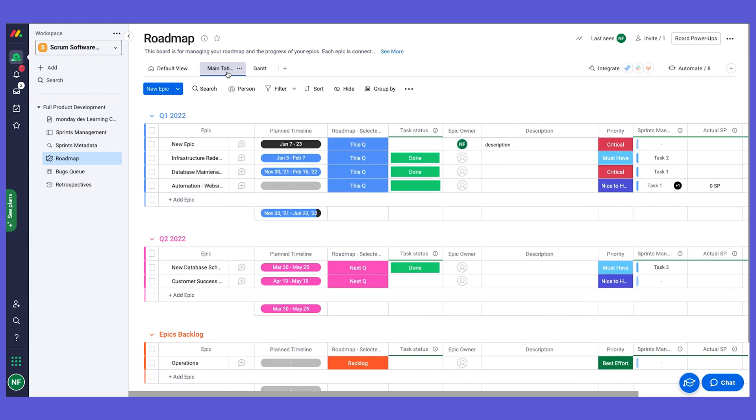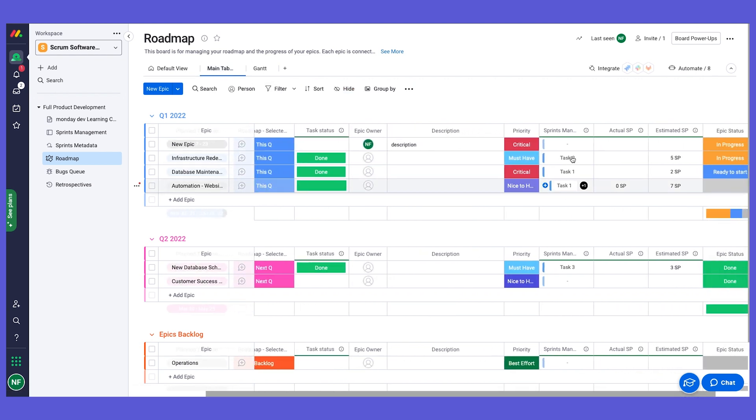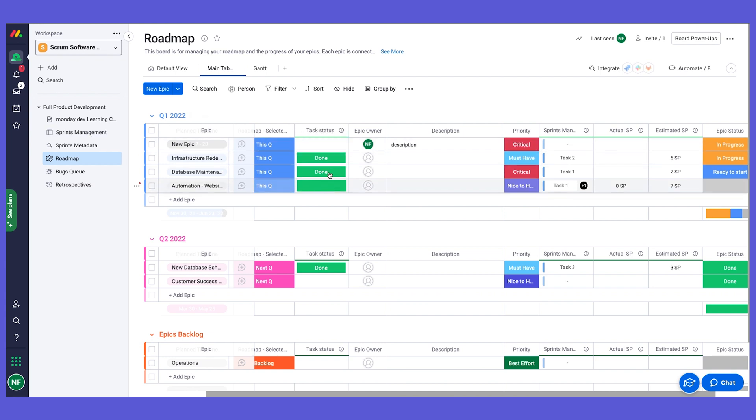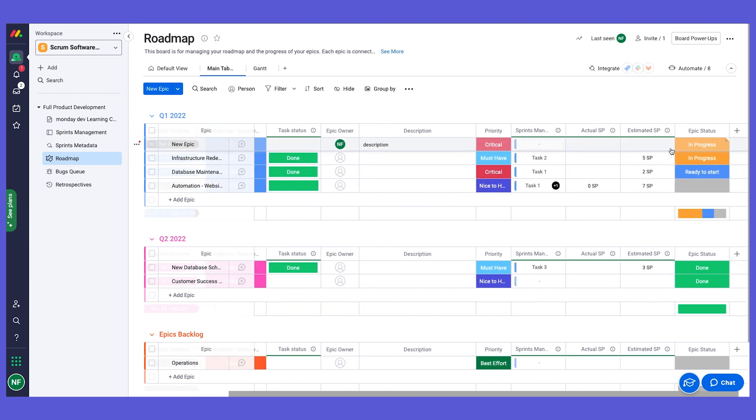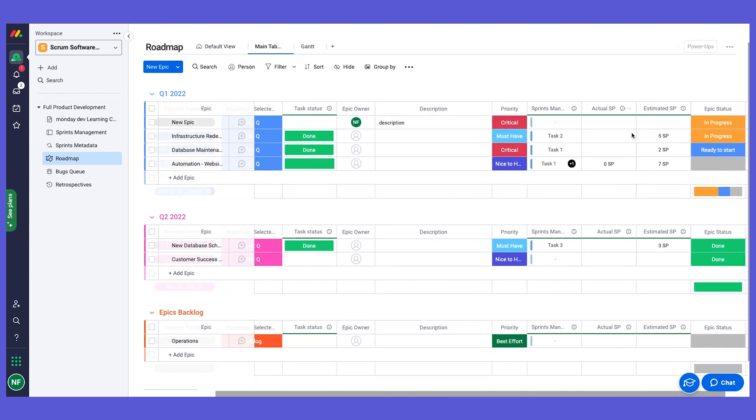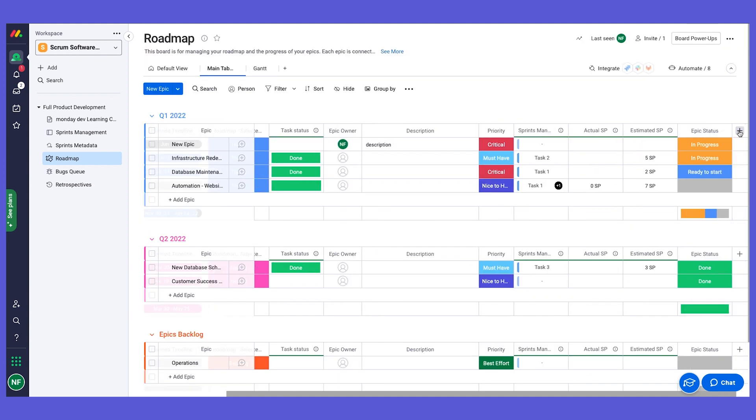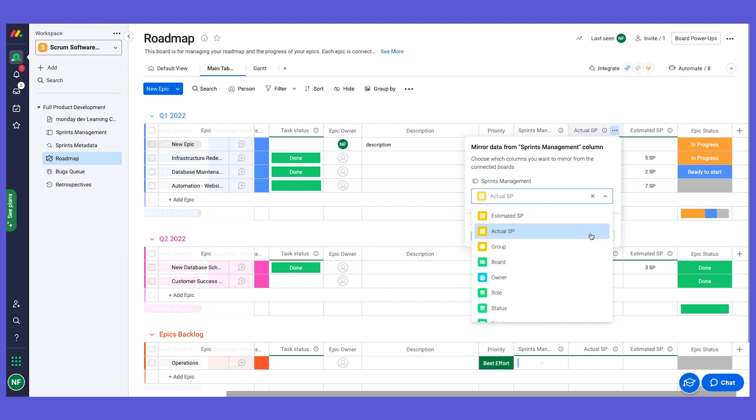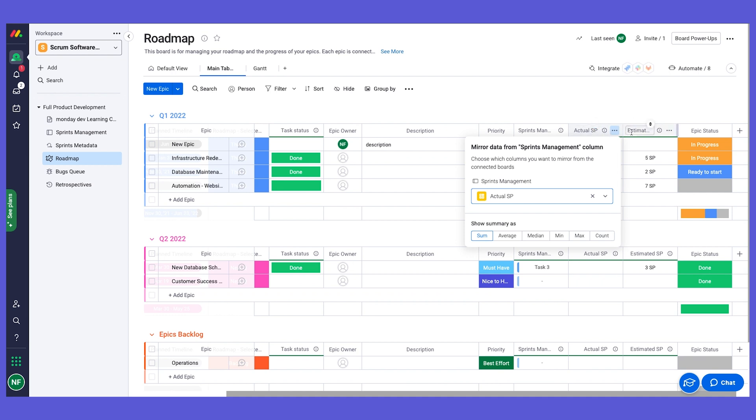Now let's go back to our connect boards to the tasks. What we did is we also created mirror columns to show us information directly from the tasks board. We actually have some information that is pulling directly from the tasks that are managed on the sprints, so we can see their status and we can see their actual story points and estimated story points. We did that using a mirror column. We added a new column and we chose the mirror type, and you can see that it is linked to the connect boards column. We can choose here what columns we want to mirror from the sprint board.